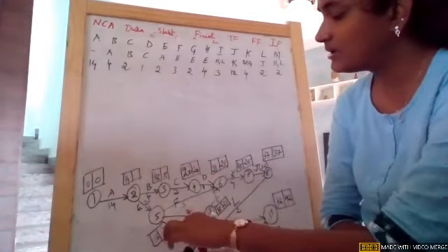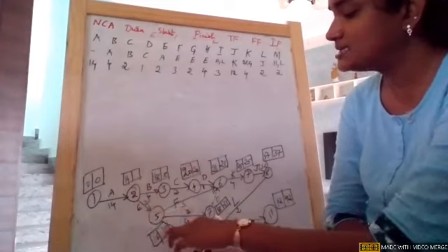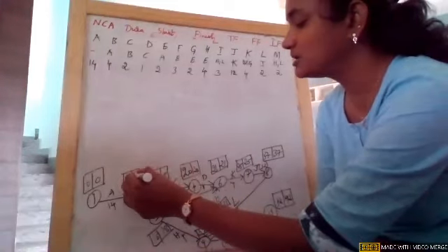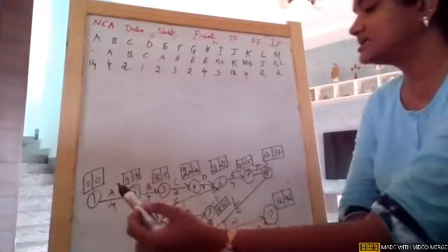From there node 2, now again 2 durations, 18 minus 2, it is 16. And 18 minus 4, it is 14. So the smallest is 14. And obviously that is 0.